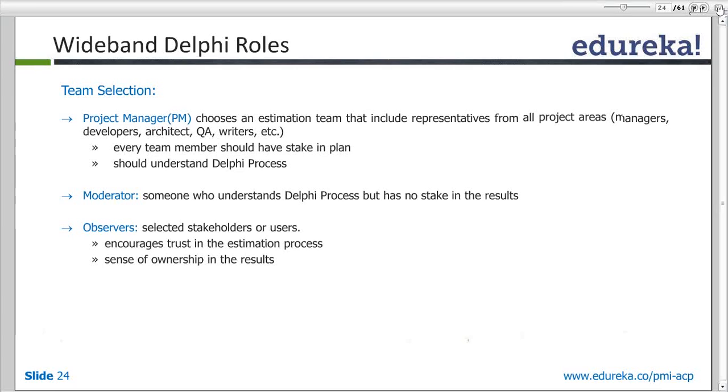Then you have an estimation session where every one of you comes, tells what was your estimate, how much you estimated, and then based on the discussions you come to one common estimate. Okay, and then you collate all the tasks which were involved in that particular requirement, and you review the final results.